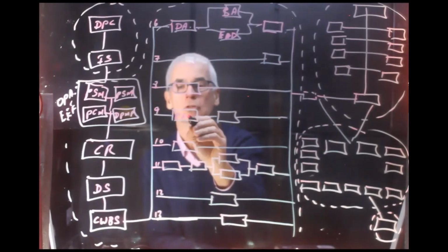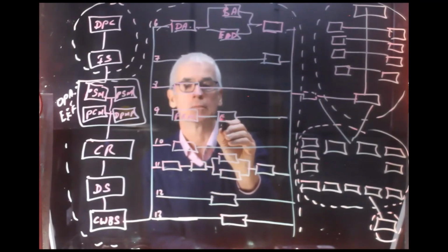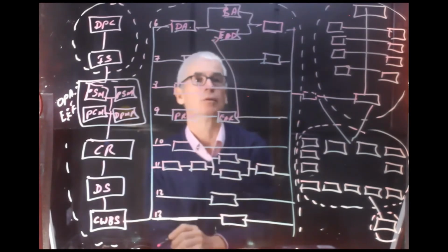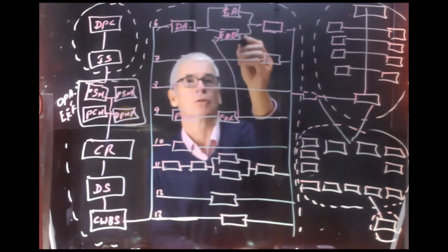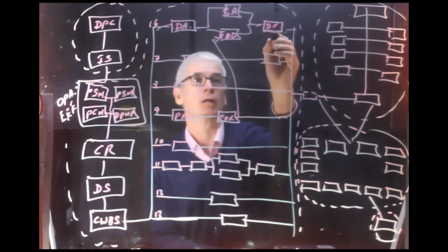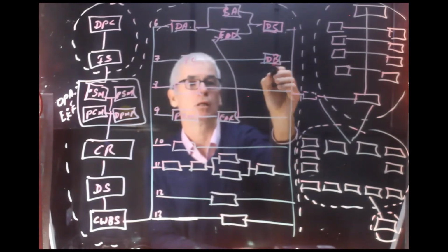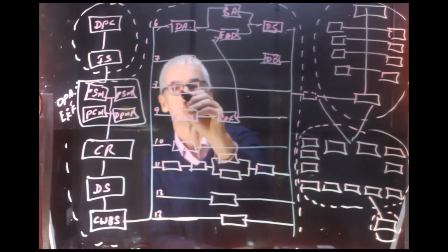But to do that, you need to plan resource management, okay? And then estimate the activity resources. That makes sense. If you have cranes and helicopters and better people, it's going to be a shorter duration, and then you can develop the schedule. There's your second baseline. And then you estimate the costs based on the work breakdown structure. That makes sense. And then determine the budget. I like that verb, determine the budget.